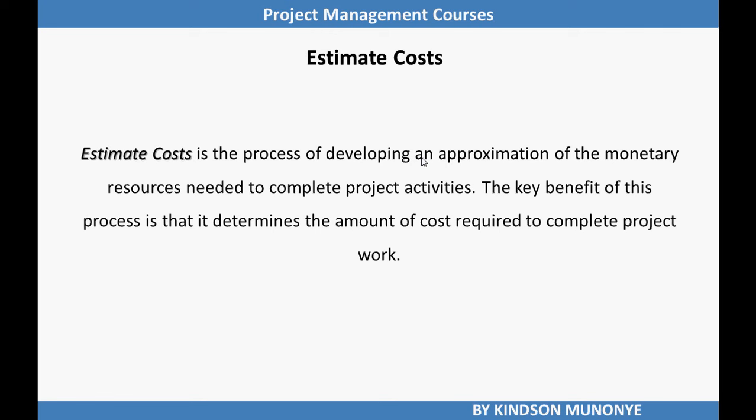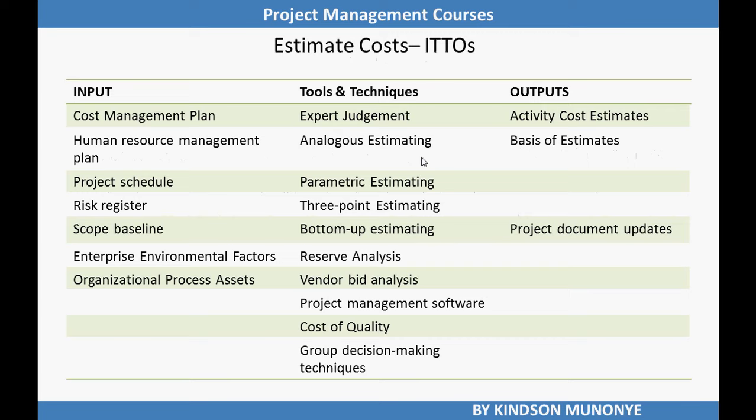Let's now look at the ITTOs of estimate costs. The inputs are: cost management plan, human resource management plan, project schedule, risk register, scope baseline, enterprise environmental factors, and organizational process assets. Tools and techniques include: expert judgment, analogous estimating, parametric estimating, three-point estimating, bottom-up estimating, reserve analysis, vendor bid analysis, project management software, cost of quality, and group decision making techniques. The outputs are three: activity cost estimates, basis of estimates, and project document updates.